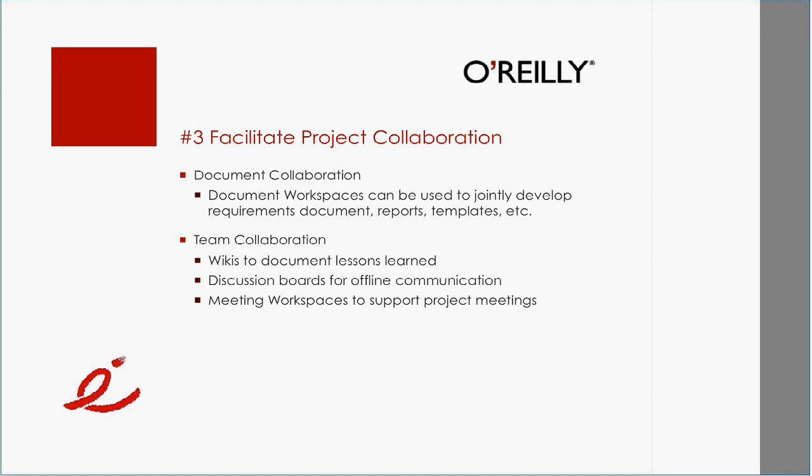For example, with respect to project management, how I would normally talk to project managers or organizations that want to roll out SharePoint, I would ask them, okay, in your project management world, what are the pain points you're feeling? Well, Dux, we have an issue with documenting lessons learned. It's just people just email stuff back and forth. It's not effective. Well, guess what? Wikis are the right way to go if you have SharePoint. Well, Dux, we have problems in clarifying requirements. Again, people just email back and forth.